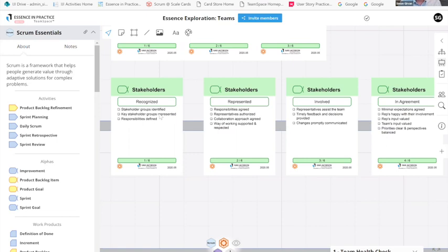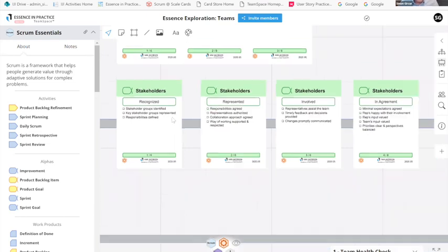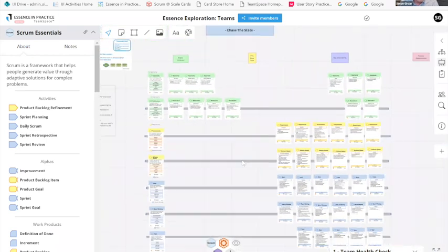And that's what makes state progression and achieving states and recording that a good leading measure, because in this example, that's a good leading measure that we might have problems with our endeavor, our project, because the stakeholders have changed. Even if it hasn't actually caused a problem yet, that's a really good leading indicator. So that's our first game.